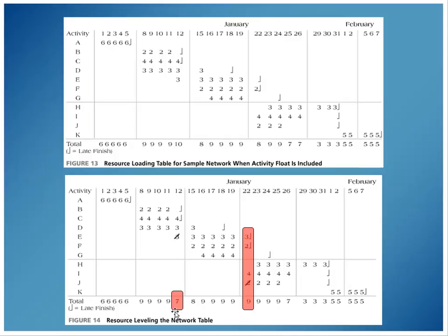Great, but that shift has a repercussion. Now if I add up day 22, I've got 3 plus 2, 5 plus 4, 9 plus 2, I've got 11. And that's a problem, so I want to shift something there. And again, looking at this, I can take the 3 days that were on 22, 23, 24 for J, make J now have 23, 24, 25.